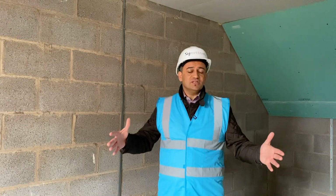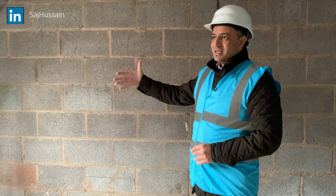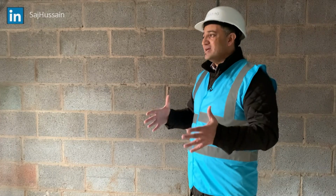As you can imagine, during lockdown, all the utility companies were building up a backlog. They weren't going out to do any installs, they weren't doing any connections, so all the orders were still coming in, but piling up. So we were in that queue waiting for things to be done on this site, and it slowed us down a bit, which wasn't great. It just means we had to move around what things we're doing in what order.